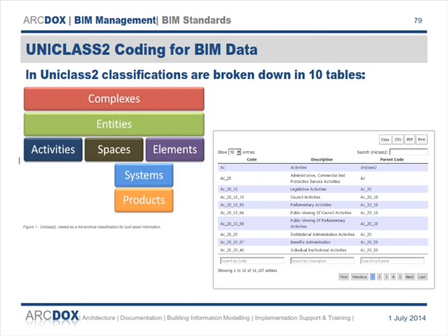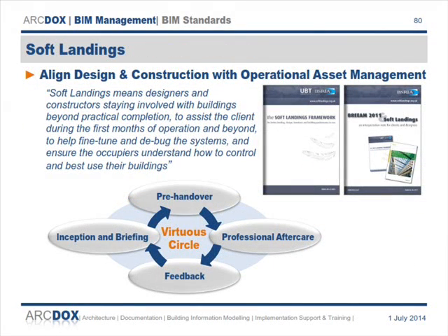And the other thing PAS touches on a little bit is soft landings. I suppose it's happening anyway, but it's a requirement now on government projects, at least, for the designers to stay involved post completion for a period of time. But it came out of studies that they did on buildings that had been built to a performance standard when measured and not performing to the standard that they were supposed to be designed to.